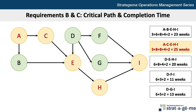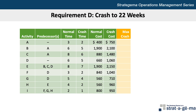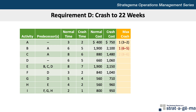Now comes the fun part, as we take on requirement D to crash the project by 3 weeks to 22 weeks, since we know our project completion time is 25 weeks. The first step is to determine the maximum crash time for each activity, which is calculated by subtracting the crash time from the normal time. The crash times listed represent the shortest possible time an activity can be completed. For activity A, our normal time is 3 weeks and it can be crashed down to a minimum of 2 weeks, making our maximum crash time 1 week. For activity B, the maximum crash time is also 1 week, calculated as 6 weeks normal time less 5 week crash time. Activity C has a maximum crash time of 2 weeks, calculated as the 8 week normal time minus the 6 week crash time. All remaining activities D through I have a maximum crash time of 1 week, except for activity H, which can be crashed by 2 weeks.